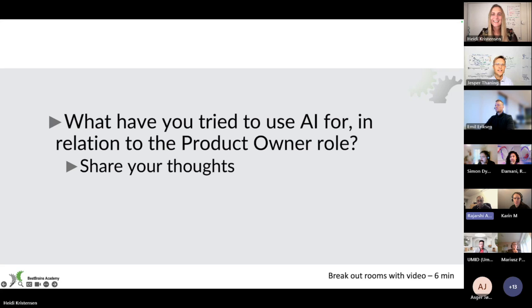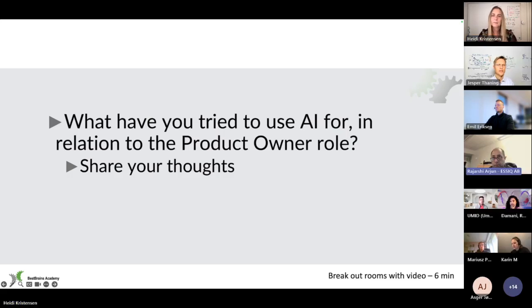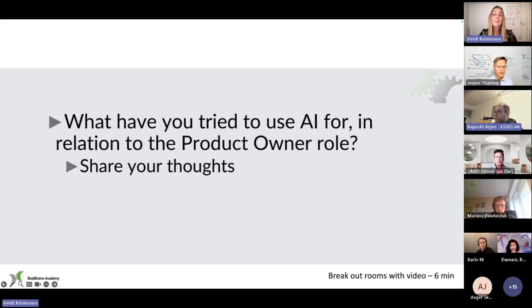So yeah, we also discussed an agent that does a lot of work, and I said that I developed an app where we give a story or an epic as an input along with a document which describes our prioritization, and the app actually comes up with a prioritization category, whether it's a must-have, should-have, could-have, or would-have. And useful? Yeah, I've tested it with some historical data also. It matches at least 85% of our previous data.